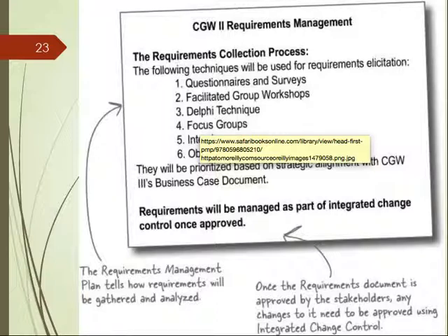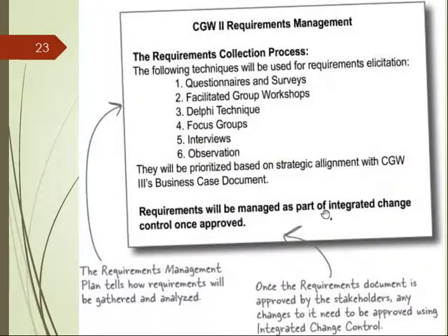Okay, so if we apply it to requirements, it can be used to identify what requirements are most important. Maybe they each write down what requirements they need. Then we can collect what they need, and also they would independently prioritize them. So the high priority ones, they open up.